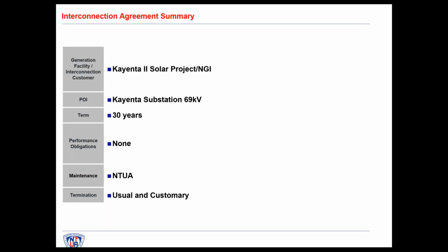And then, of course, there's always interest in what the interconnection agreement looks like. There's a lot more detail to it, but this is what we provide, and then we go into detail from here. But the interconnection is key. It's very important, and again, as I mentioned, it's important to have some proximity to a robust transmission system or the ability to construct one in order for a project to be successful. If the proximity is not available, the cost goes up substantially and it becomes less and less beneficial to build the project.